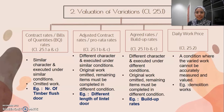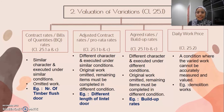Second, valuation of variation under Clause 25.1. First, contract rate or BQ rates under Clause 25.1A and C — similar character and executed under similar conditions, treated as omitted work. For example, a different number of timber flush doors. Second, adjusted contract rate under Clause 25.1B and C — different character and executed under similar conditions, where original work is omitted and remaining items must be completed under different conditions. For example, different length of lintel. Third, agreed rates — different character and executed under different conditions. For example, build-out rate.